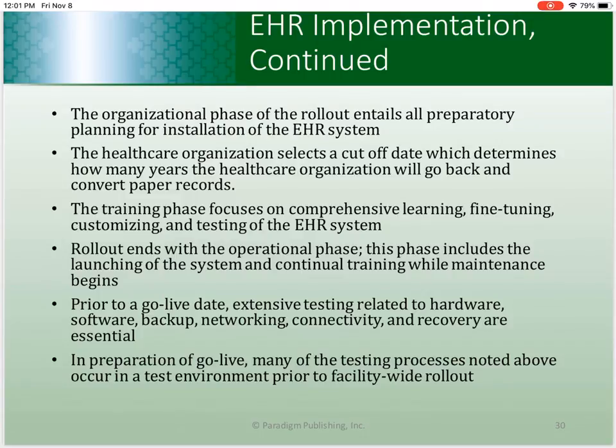And again, it's very important that every member of the organization is prepared for the go-live date. If they're using a commercial product, then the vendor is usually going to have a customized checklist. They're going to determine provider schedules, plan downtime to catch up, and inform users where they can go to get help. Some places will set up a command center with a command line that you can call if you have questions, or places where you can go to get additional training.